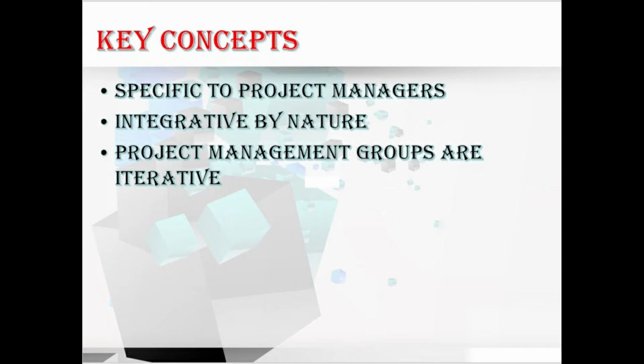The second key concept is integrative by nature. Projects and project management are integrative by nature. For example, a cost estimate needed for a contingency plan involves integrating the processes in the project cost management, project schedule management, and project risk management knowledge areas. So they are integrative across all these areas.